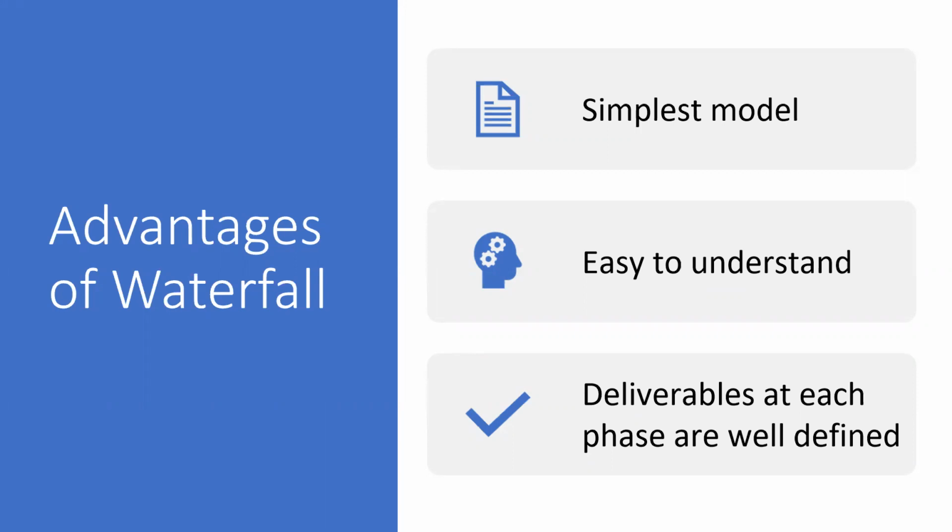This is a very linear flow. If I need to develop, the requirement analysis phase should finish and the designing should finish, and then only I can start with the development. Until and unless those phases are frozen, I will not be able to develop.